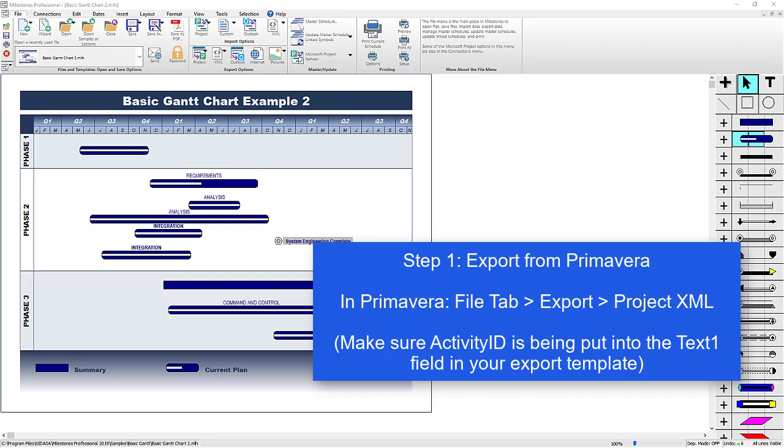In Primavera, you go to the File tab and choose Export, and then make sure you choose MSProject Schema XML. You will also want to make sure that your export template that you choose is exporting Activity ID into the Text1 field.